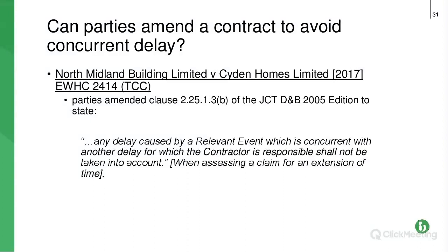Yes, this case, a 2014 case, North Midland and Sidon, and in this case, they had a clause that specifically said, and it's quoted there, any delay caused by a relevant event, so we're under JCT, so we know a relevant event gets you, contractor or subcontractor, an extension of time.